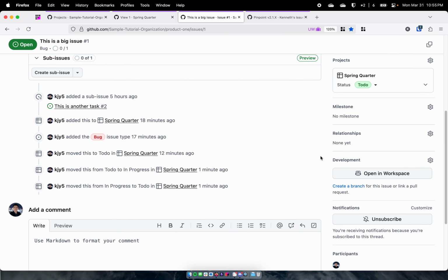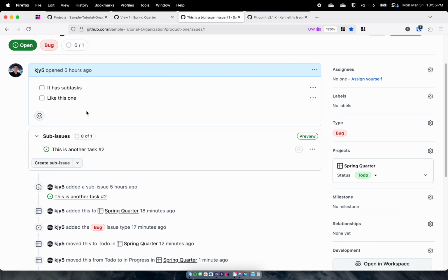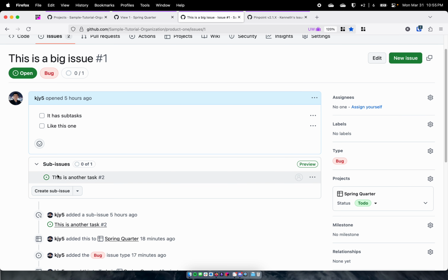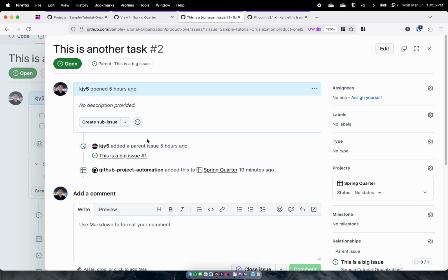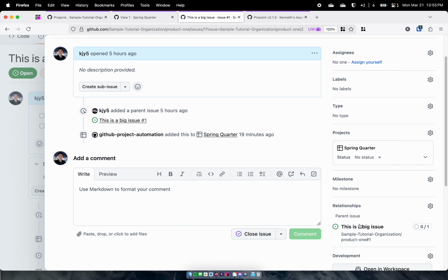Yeah, and subtasks. When you create a GitHub issue, you can always use markdown checkboxes, and that will create a counter for tasks specific to this issue. And then recently you can create sub-issues, which link to other issues in a one-to-many relationship. This is a parent issue that links to many sub-issues, and these sub-issues are just normal issues themselves, except they have this hierarchical relationship. This isn't a strong interdependencies marker, but it does show you if there's a relationship and how many subtasks are completed from the main issue.